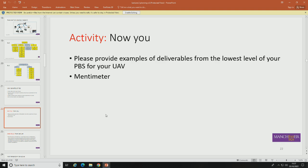Sometimes it's in line with procurement. There's something called a packaging breakdown structure for contracts. That's where, in more advanced work, you would take the product breakdown structure and try to move towards asking, is that easy to give to a supplier? In terms of mechanical engineering design, and in terms of systems and subsystems, I guess there's a natural development through inputs and outputs and assembly interfaces and communication protocols and different things like that. So it becomes more of an engineering paradigm. But from a project management perspective, is it a bite-sized chunk of work? And can you give it to one supplier to make by itself?